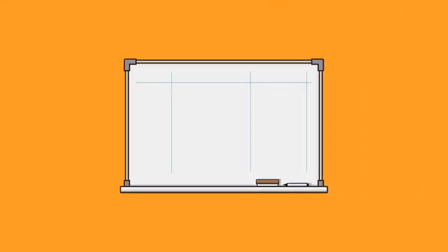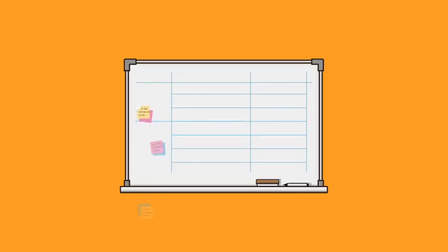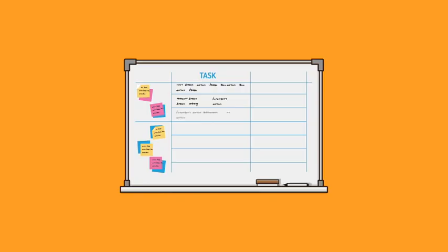The plan doesn't need to be detailed, thorough, or complete, but the developers should leave sprint planning with a set of product backlog items they plan to deliver within the sprint, and at least a rough plan of how they'll work together to do it. This means that most teams augment the set of product backlog items for the sprint with a short, rough list of tasks for each item.